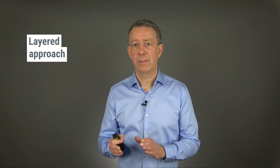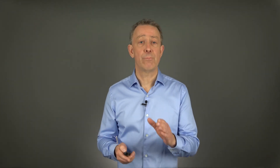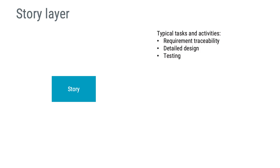I suggest looking at four layers: story, increment, release, and project. A story contains actionable work, also known as work items. It is reasonable to establish evidence of design, requirement traceability, and testing relating to the story. You could also consider integration and system testing, but saving this for the next layer might be more convenient.